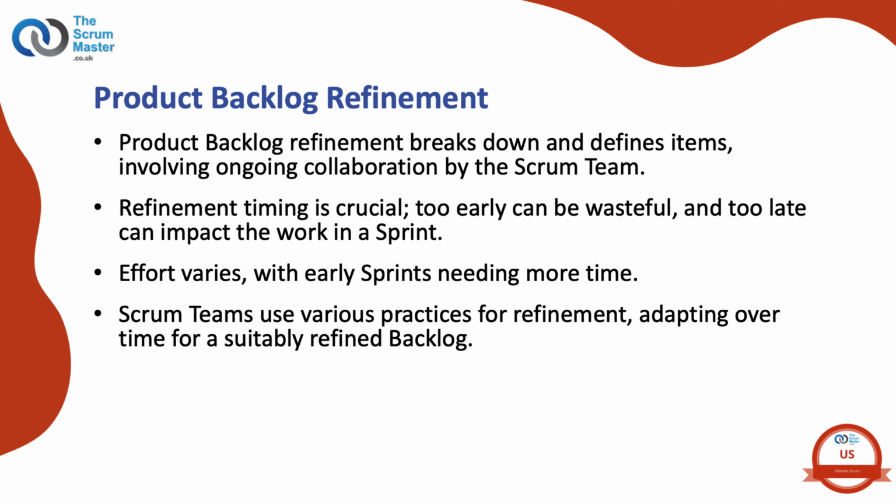A spike should have clear objectives and expected outcomes. It is a good practice to timebox spikes as research and learning can be unlimited, and good enough results can be achieved by increasing understanding without seeking perfection.